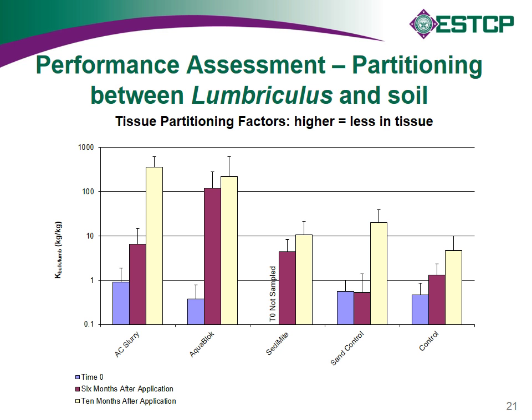We didn't clear vegetation willy-nilly. We ended up doing everything we could to avoid clearing of vegetation, in part because that's what our core permit required. So we didn't put any permanent roads in. We put the plywood walkways that I showed earlier, and the vegetation was cleared only in the Phragmites plots, and no grubbing or anything like that.